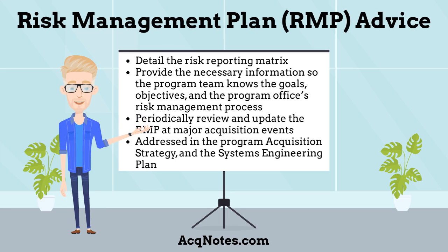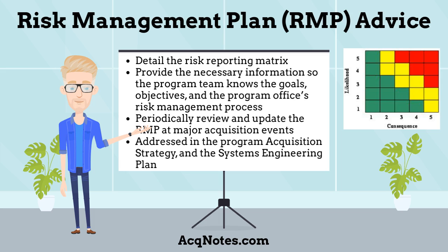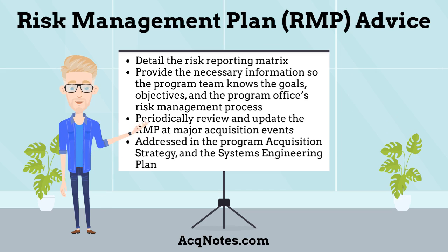Here are a few risk management plan tips. The risk management plan should detail how to use the risk reporting matrix to determine the level of risks identified within a program. The level of risk for each root cause is reported as low, green, moderate, yellow, or high, red.